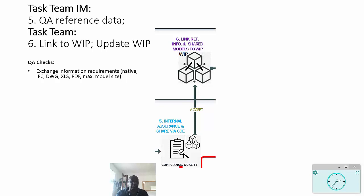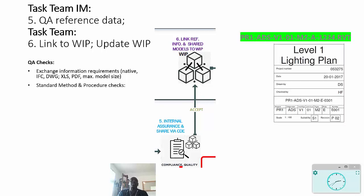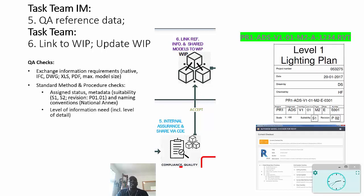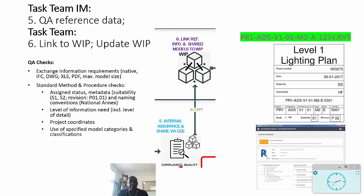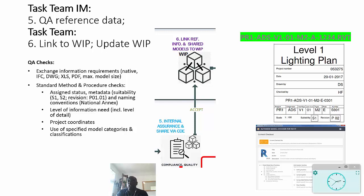There is something known as a standard method and procedure, and this is about checking on the assigned status that we give to information. So what about the suitability - S1, S2, and so on? These are labels that we apply to information to ensure that its purpose is fully understood. Also, we need to be able to control revision and version. Version is something that is part of your internal change management process.